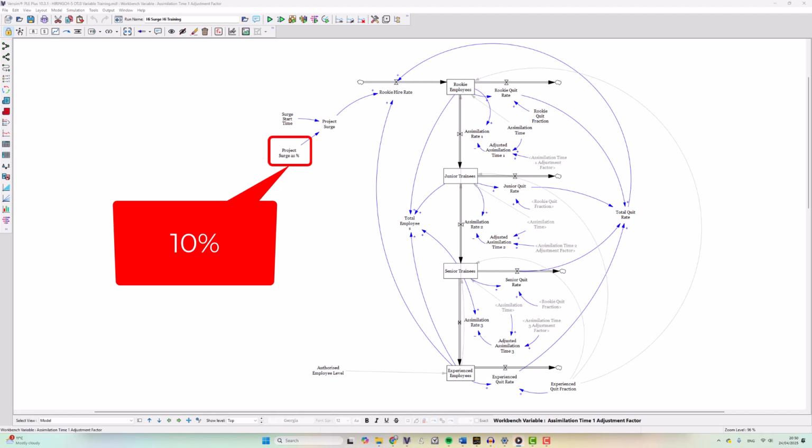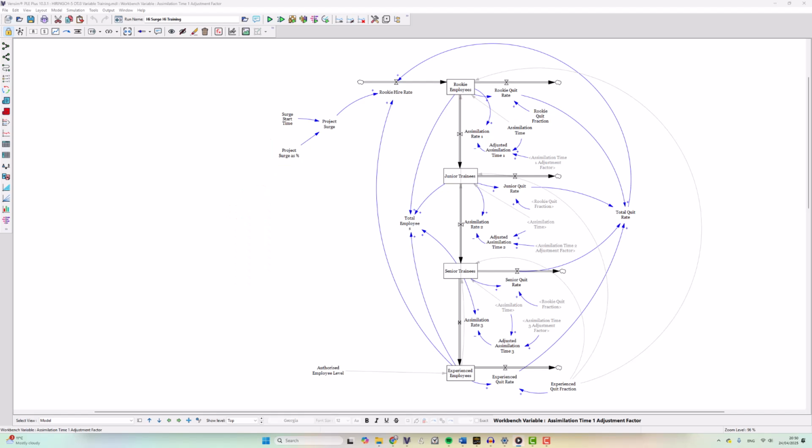This means that the project will take on employees, or more realistically, contractors or consultants, equal to 10% of the existing employees. Of course, those existing employees would be in IT or whatever project is taking place. Those experienced employees need relevant knowledge to be able to train the rookies. So, if you're a supermarket with 20,000 employees, 500 of whom are in IT, the 10% surge would be an IT project of 50 new employees or contractors. 10% of the 500 in IT.